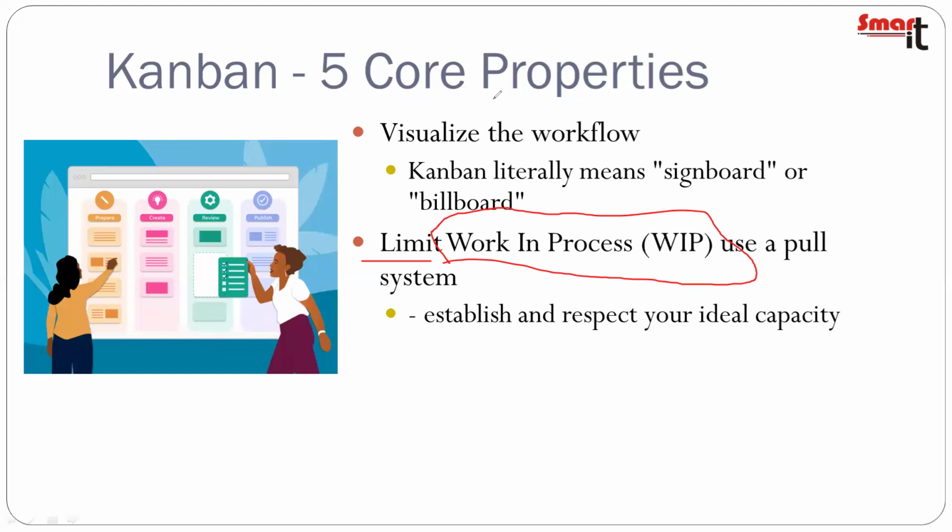So when it comes to Kanban, it says limit WIP, because too many WIP items sometimes decrease our progress. Here WIP means work in process, but if you are using too many WIPs, it may decrease our progress, right? Opening too many works will decrease our progress.